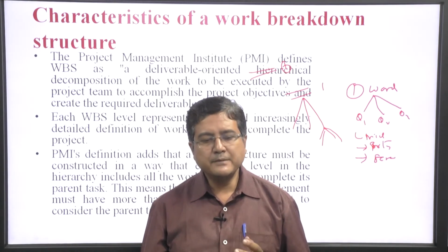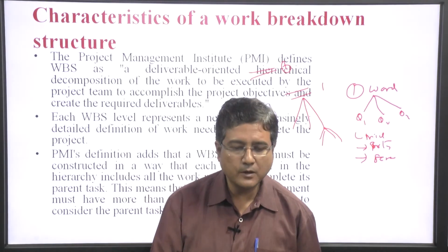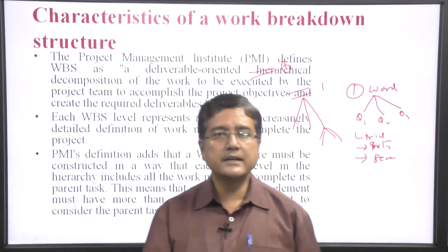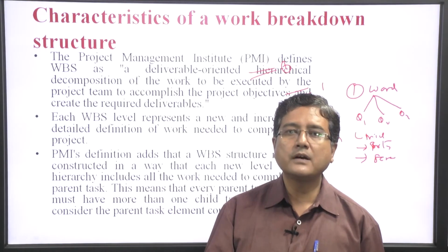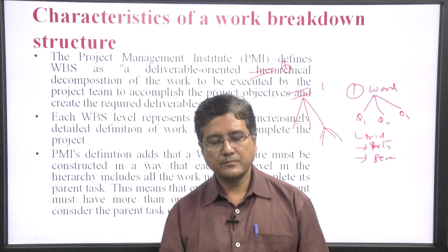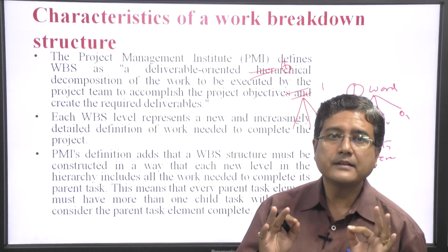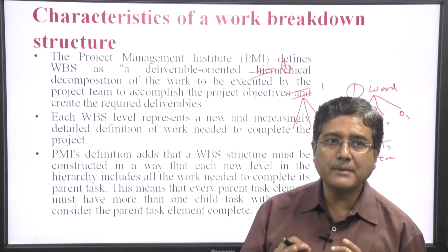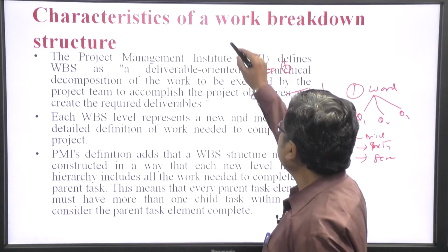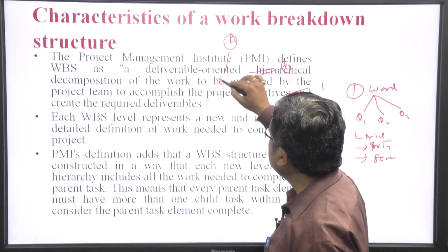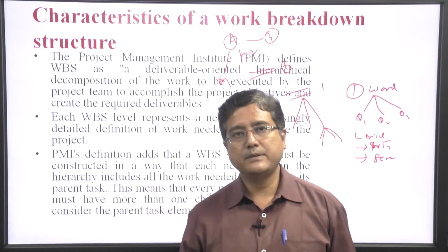The Project Management Institute defines that a WBS, work breakdown structure, must be constructed so that each new level in the hierarchy includes the work needed to complete a parent task. This means every parent task element must have more than one child task. If A is the parent task, then A1, A2, A3 are child task elements.